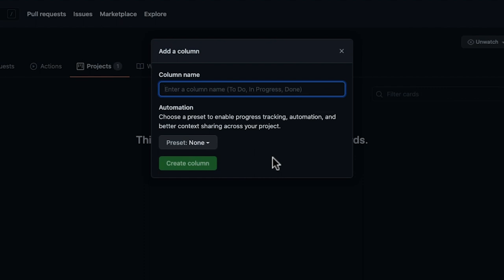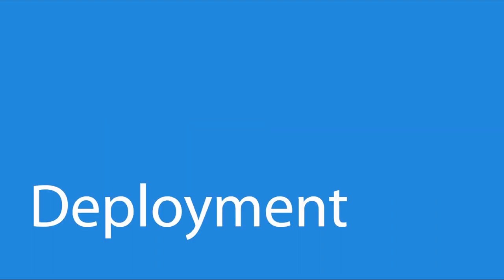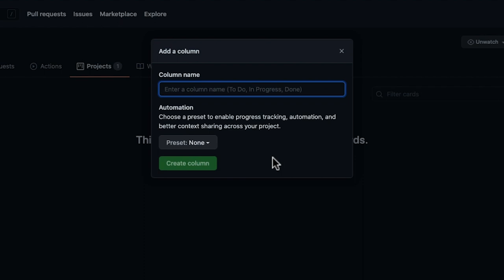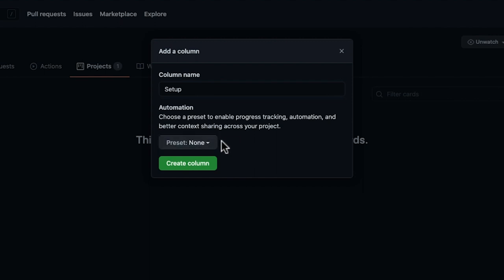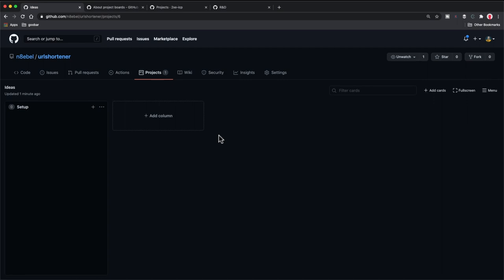So now I have created this new Ideas project board, but it doesn't look very useful right now because it's not created with any columns by default. So the first thing we're going to want to do is click this "add a column" button. Now we can start thinking about how we want to break our project down. For small projects, I often like to think of my project in three phases roughly. Usually these phases are grouped into something along the lines of the setup phase, the implementation phase, and then the deployment phase. So think about what conceptual phases you want to break down — we're going to map these columns to each of those phases. I'm going to call this first column "setup," select none for automation, and click create column.